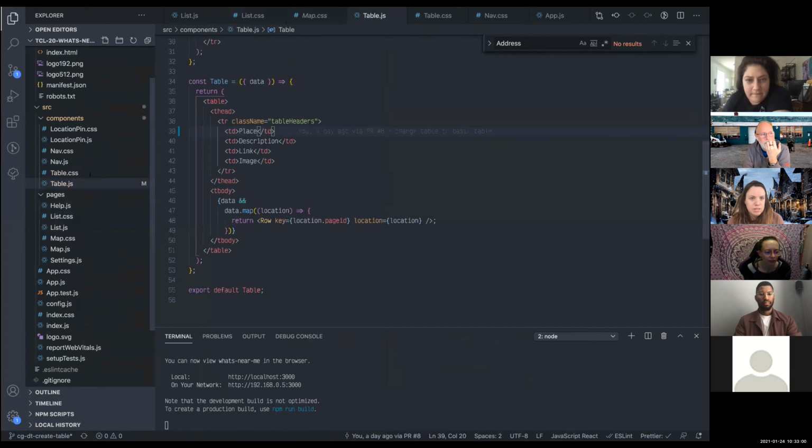Well, that goal, or that action, I guess, to register for an online auction website can be broken up. We could take that and break it up into two different stories. So I want to be able to enter my details, but I also want to be able to submit the details. You might build a form, but you also want to be able to submit it so that it gets saved to the database or something. Those both have the same "I can" as the parent story, right?